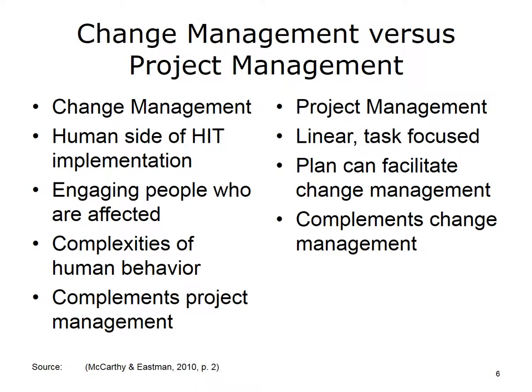McCarthy and Eastman discuss other concepts that could be confused with change management. They indicate that one meaning of the expression change management relates to technical issues, such as software version control, but that is not the kind of change management we are talking about here. They also contrast change management with project management. Change management involves people, or what they call the human side of IT implementation. A key element for a successful project is to engage those individuals who are going to be affected by the change. Project management is much more linear and task-focused, whereas change management deals with the complexities of human behavior. A good project management plan creates a structure and a foundation in which the change management process can occur. The two disciplines, though different, complement and support each other.